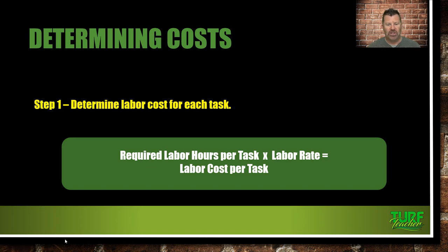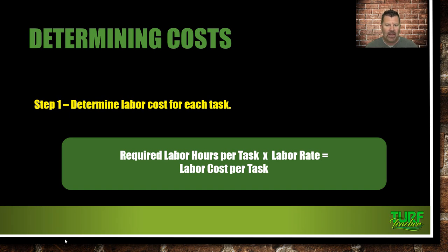Determine your labor cost for each task: required labor hours per task times your labor rate equals your labor cost per task. What is a good hourly billable rate? I've always said you're breaking even at $50 an hour on a mowing crew. A two-man crew is $100 an hour — and that's just your cost when you factor in taxes, insurance, employee wages, unemployment tax, social security, fuel, wear and tear on machines, and travel time when you're not actually cutting yards.